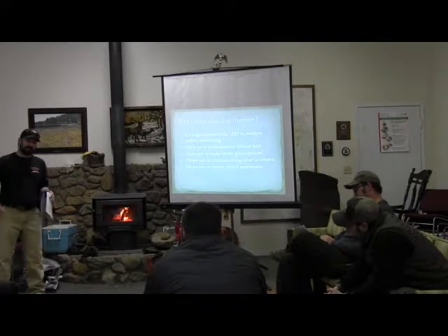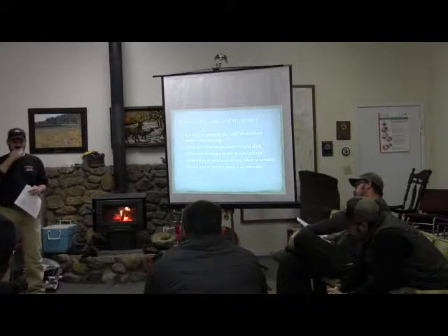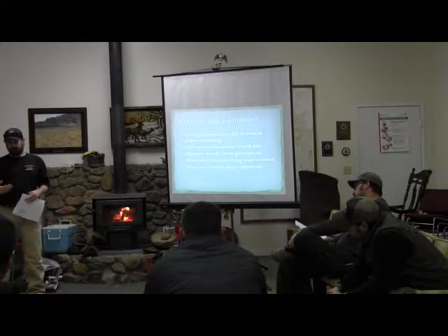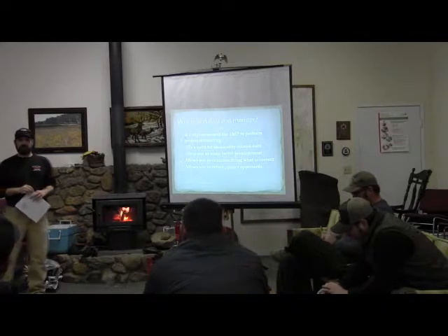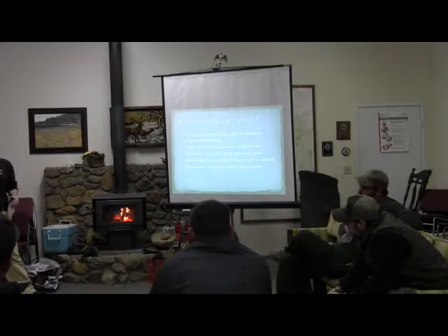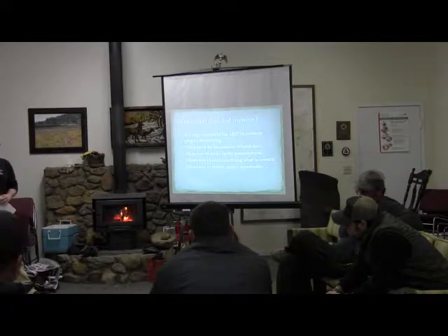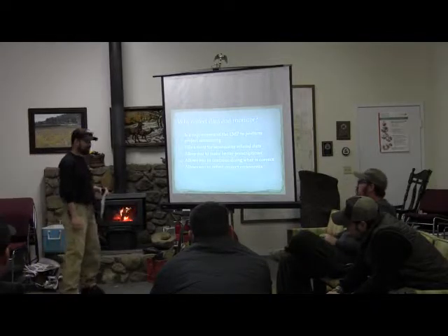But if there is a monitoring plan in it, they need to make sure that it gets followed because they're in charge of that day. I would say the fuels officer or the project manager is probably more liable to be following that project. So for most fuels projects, that's your fuels AFMO or the fuels tech. As a burn boss, what I would urge you to do is please use fire effects monitors.